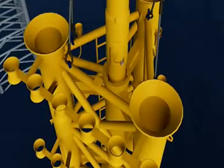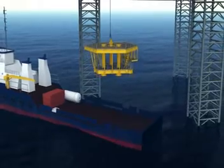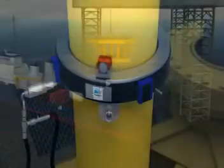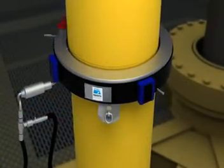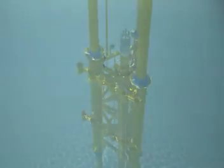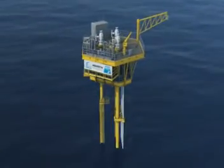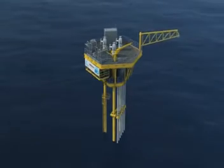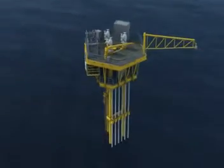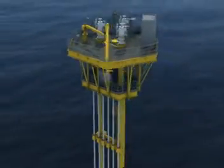C-Swift from Aquaterra Energy complies with all industry standards and regulations and offers considerable benefits over conventional platforms. A project's critical path is simplified and costs are significantly reduced, because C-Swift is lighter and quicker to fabricate than conventional platforms, requires only a jack-up and supply boat for installation, and removes the need for a conventional jacket or standalone piles.